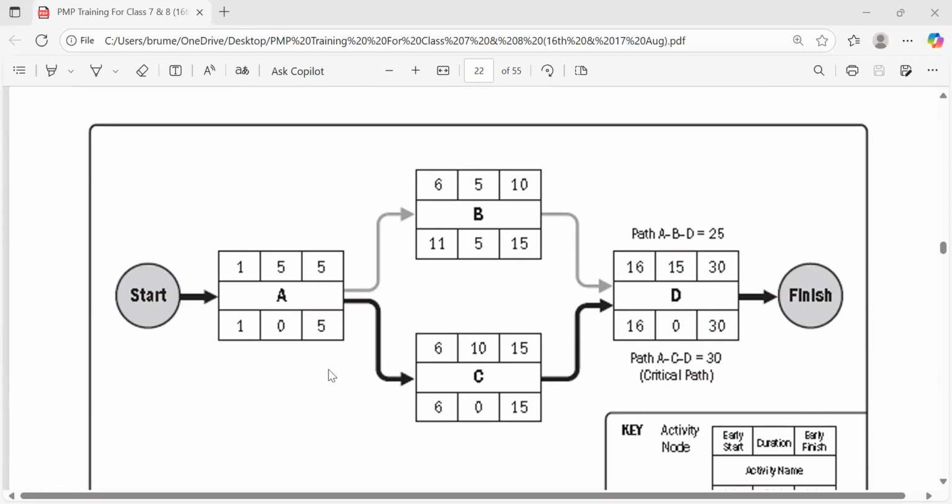You know, it's happening sequentially with C, but I want to make it concurrent and bring it back to where A and C are and put it on top, and I announce that activity D now will not happen at the end of C. It will happen at the beginning of A. Let activity D have a start-to-start relationship with A. So which means as we finish A and as we are finishing C, D will be finishing, right? Because A and C are both 15 minutes and D alone is 15 minutes. So which means all of them will finish at the same time, right?